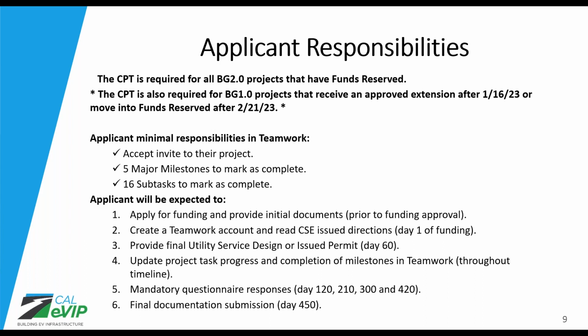Update the project tasks and milestones as they are completed in Teamwork. As I mentioned, there will be mandatory questionnaires starting at day 120 and every 90 days thereafter. And then obviously your final document submission on day 450, unless you have an active approved extension.